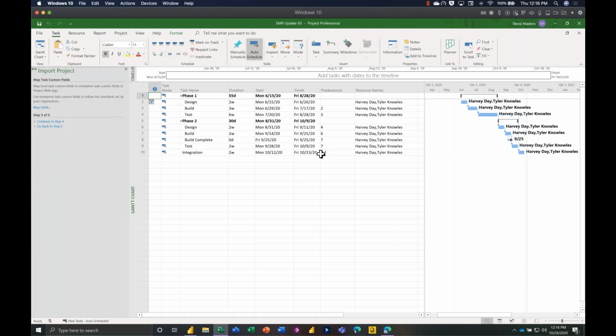When do people use task custom fields? Well, people use task custom fields when they want to provide additional metadata about each task. A great example of this is that some organizations establish a project health check, which is a set of custom fields sitting in their project schedule that show them whether they are over-allocating resources, or whether they have tasks that don't make sense, or whether they've failed to baseline their project. All these kinds of ideas we can put into custom fields.